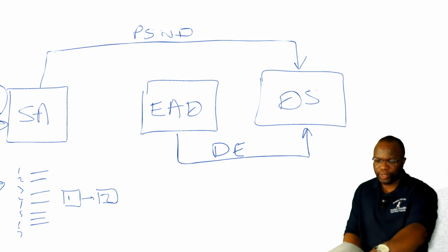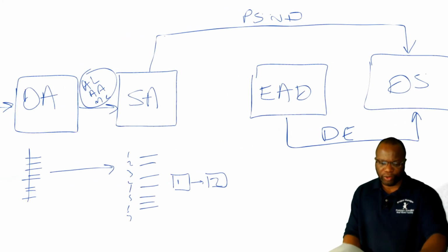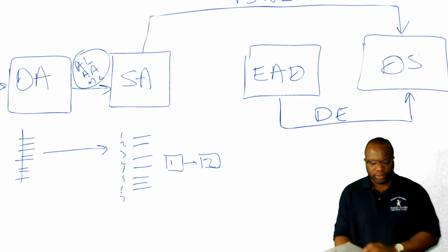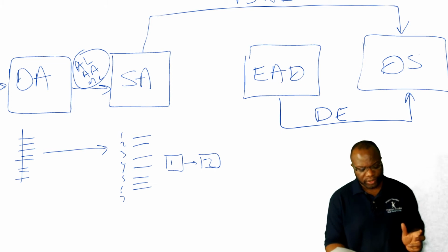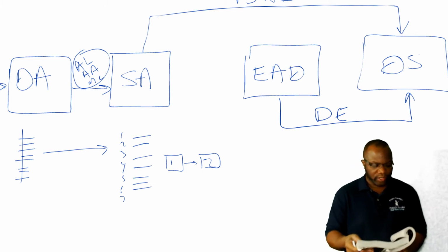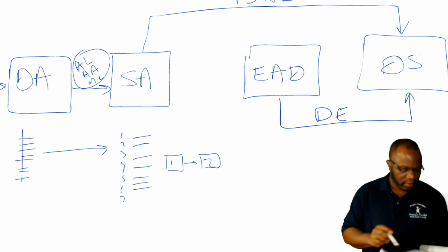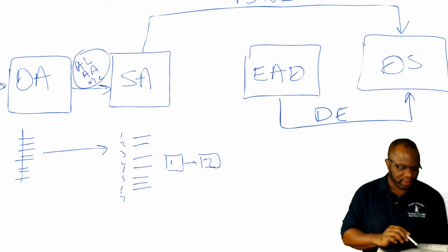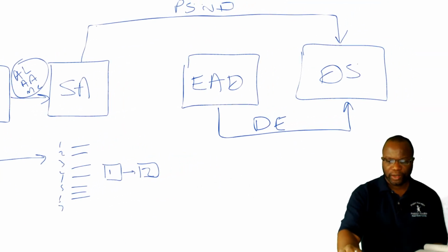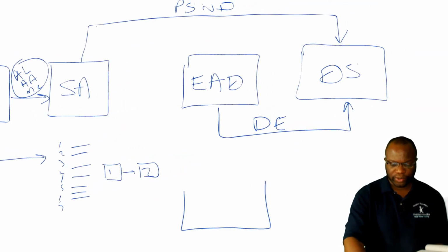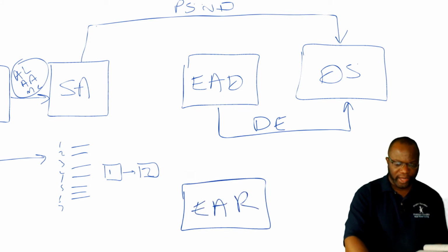But there's one more thing to be aware of. This is where it gets a little bit more convoluted. So if you take a look at estimate activity durations on page 195, what do you see? You can see the resource assignments, okay? You can see the project team assignments, and you can also see the resource requirements. So there's a loop from outside of this knowledge area, which is important, and this is estimate activity resources, and we have the resource requirements.